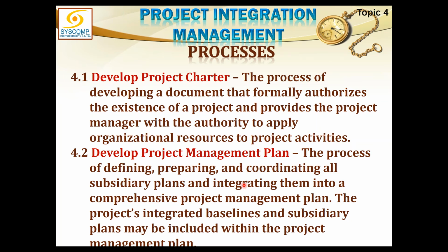Develop project management plan, we clearly understand, commands and leads all the other 9 knowledge areas, helping them develop their plans and then consolidating them all together in one project management plan, which includes all the instructions about all the 9 knowledge areas, but also includes the final version of the plan which is to be executed, which we call the baselines.